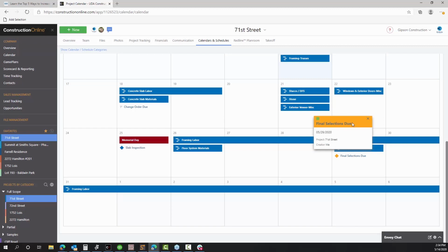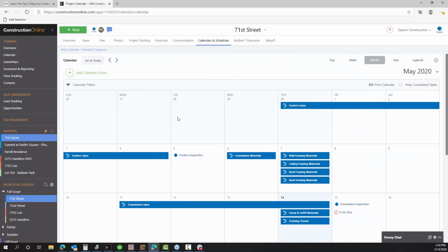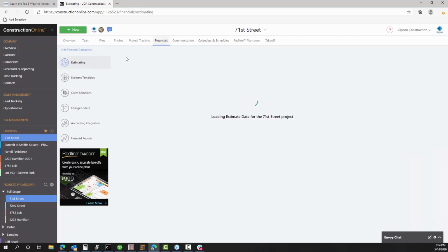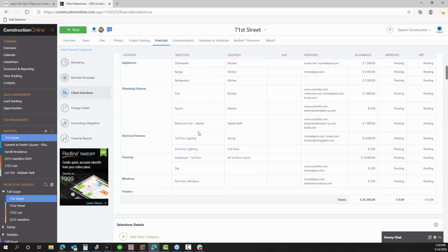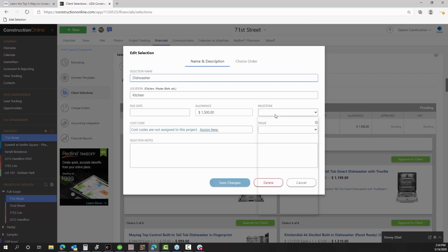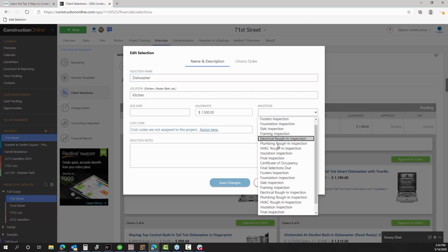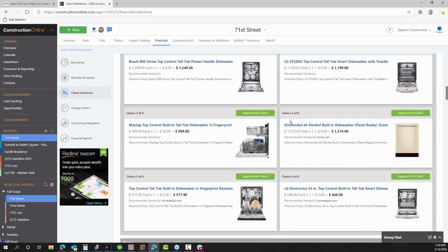And sometimes this varies a little bit too, depending on the type of work that you're doing. That'll look different for a custom home builder versus a production or neighborhood development contractor, and it looks a little bit different on commercial projects as well. The other approach that I see people take is very similar to what Jordan just walked through, where we do go ahead and start construction, but we do set some firm deadlines for selections, which, as we can see here, can be tied into those milestones, which makes it really dynamic if the schedule begins to shift.